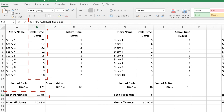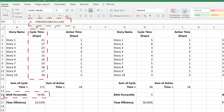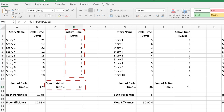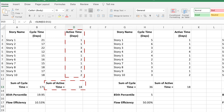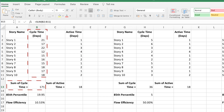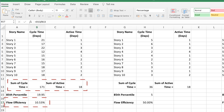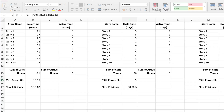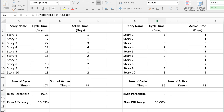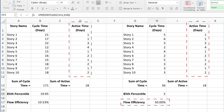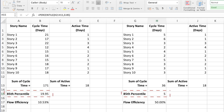So let's take this a little bit further. Let's say that your 85th percentile for your process is 20 days, meaning you've got the cycle times for all of your previously completed stories and you've used something like Excel's percentile function to calculate the 85th percentile. To calculate your flow efficiency for all previously completed stories, simply sum up all of the active time for each story and divide it by the total cycle time for the same stories. In this example, you can see that the flow efficiency for our process is 10%. If you aggressively go after that inactive time and manage to reduce it significantly, and end up getting your flow efficiency to 50% while keeping your active time the same, that would mean that your 85th percentile would be five days instead of 20. Much, much better.